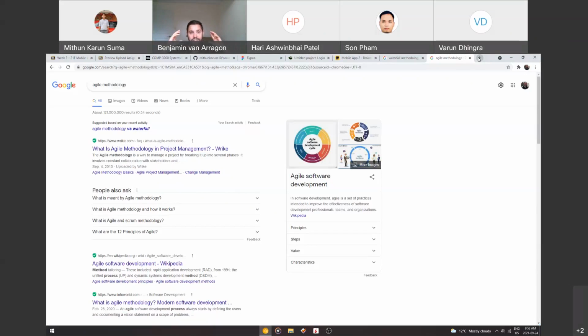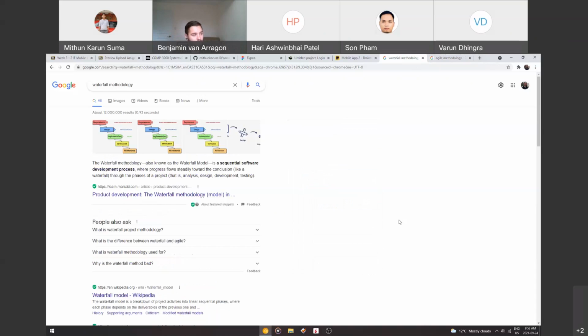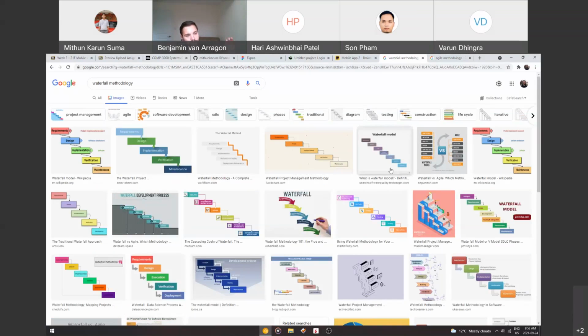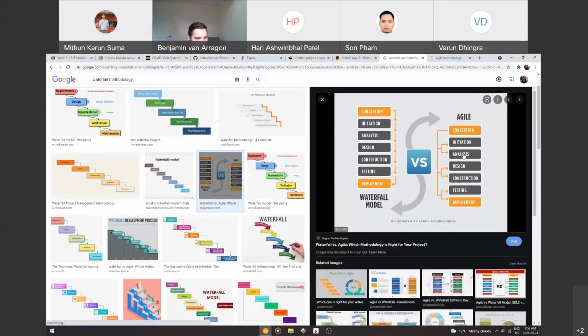And you'll select a certain number of tasks to finish and develop. And at the end of those 2 weeks, all of those tasks are finished and working and debugged, and you have a complete product that's actually working. Whereas the waterfall approach, which is what you typically would do, kind of starts and does it all in one shot. So here's maybe a versus.